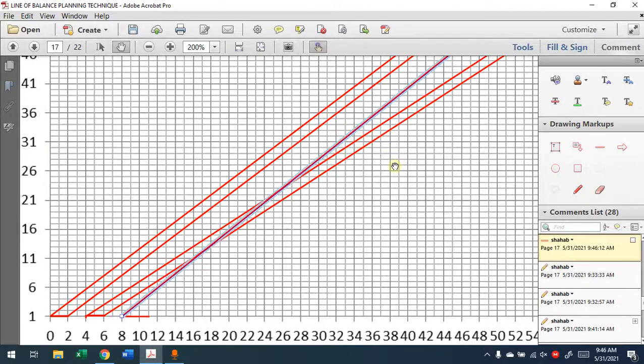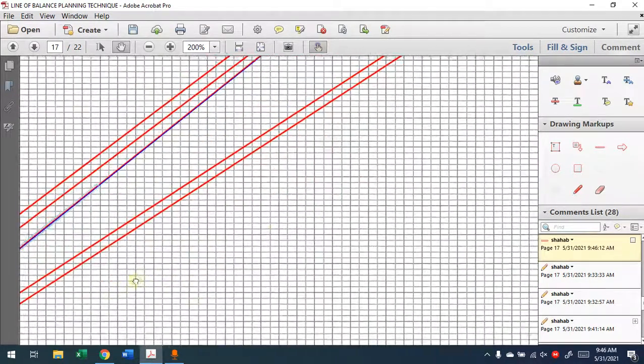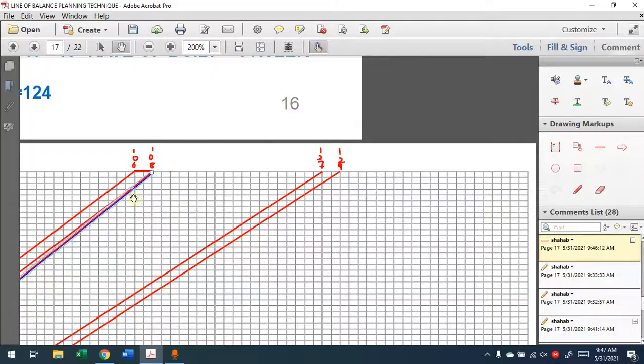So why does this cut happen here? Because the natural rate of the third activity is higher than the second activity, and they are depending on each other. So you cannot start from the bottom. What does that mean? We will add the buffer to the top.